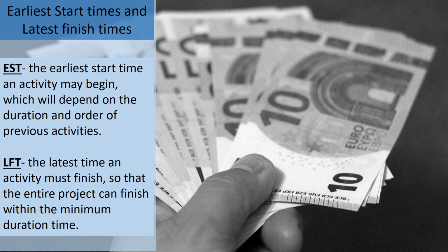And LFT is the latest time an activity must finish, so that the entire project can finish within the minimum duration time.